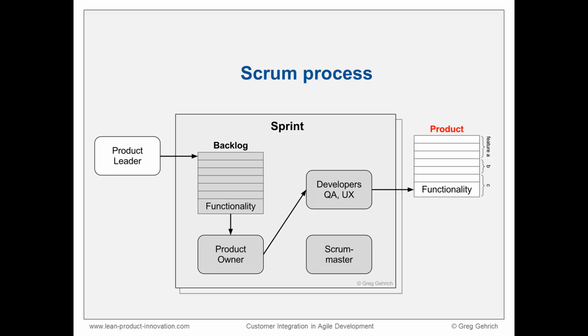As you can imagine, there are challenges that come from coordinating multiple teams that produce work concurrently and synchronizing it every few weeks. One of these has to do with the workflow through the system. When the work is on a train schedule, it has to be delivered within the agreed amount of time. Unforeseen obstacles, technical glitches, personnel issues, and inaccurate estimates often complicate even the most carefully planned train schedule, creating imbalances between the various teams.